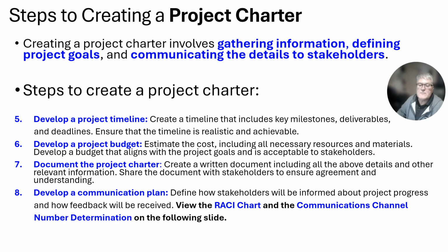Continuing on with the steps for project charter creation: develop a project timeline, develop a project budget, and document the project charter. That will be creating a document for people to sign off on, and to share with all the stakeholders that are going to be impacted by the project. Then develop a communication plan. A communication plan is there to let the project team know who they're going to communicate with and when they are going to communicate with stakeholders.